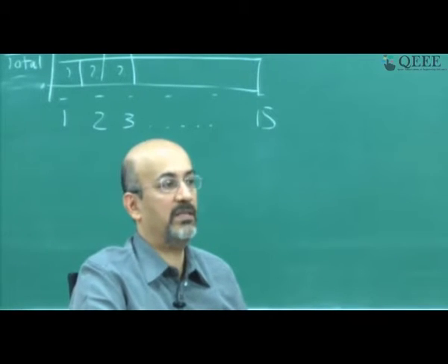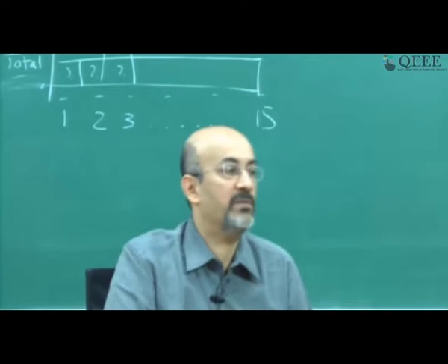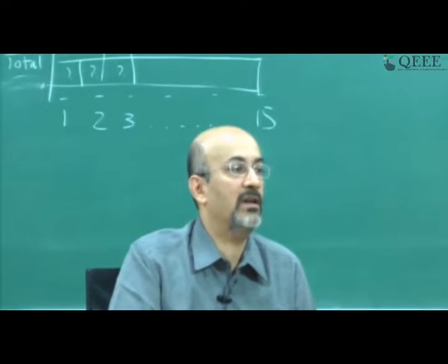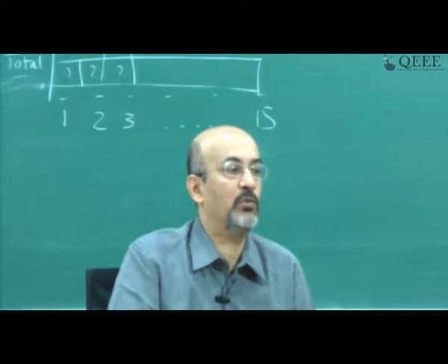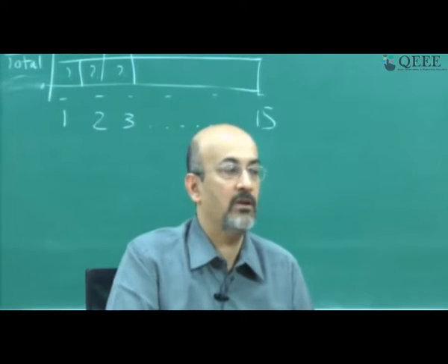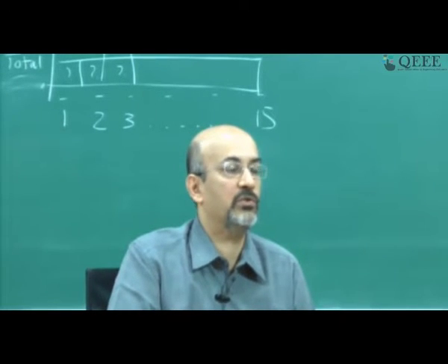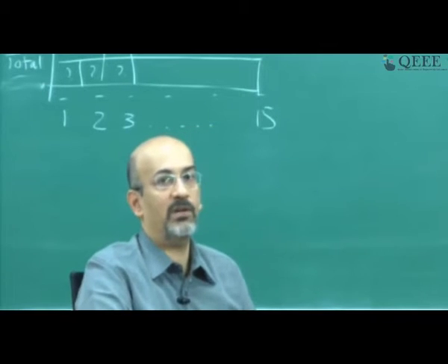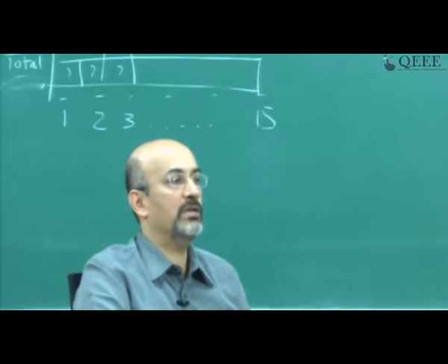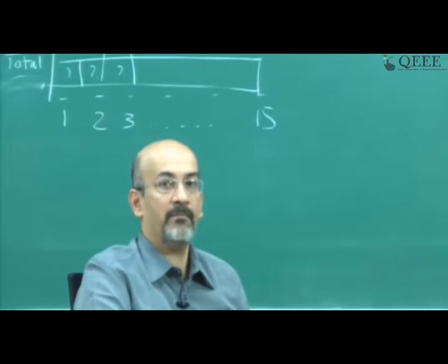So I would like to spend my money later, which means I would like to go on the late curve. But if I spend it too late, my project might be delayed. So the S curve is used to find out what is the best way to balance. That is one.